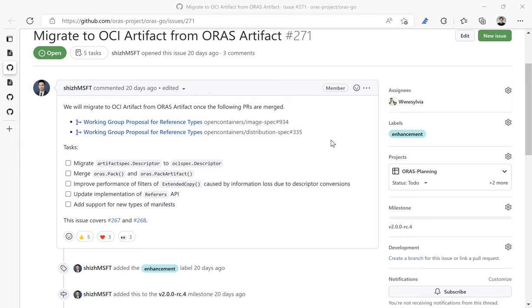Got it. So maybe that's the data, Steve, I would like to look for. If it's possible, you and Shiva, by say next week or two, to get a good scope estimate on it. That way Steve and Niaz and others can make a better decision: hey, this is this much scope, there's no way we can fit it in, let's plan for RC2. But until we have a good scope, I think it's hard to make the call. Yeah, I think once we are done, we can share it with you. Okay, sounds good.